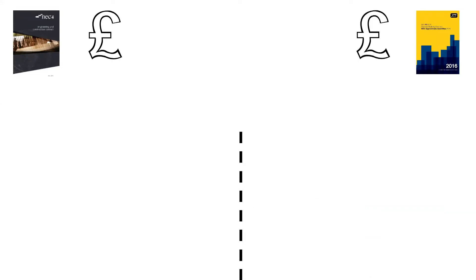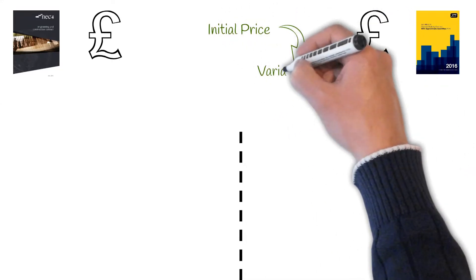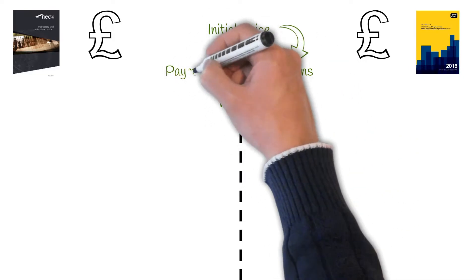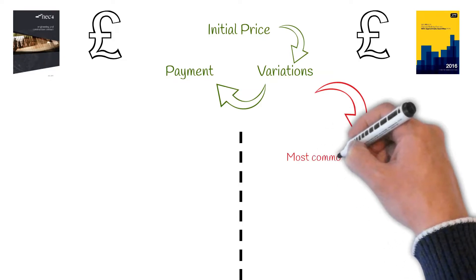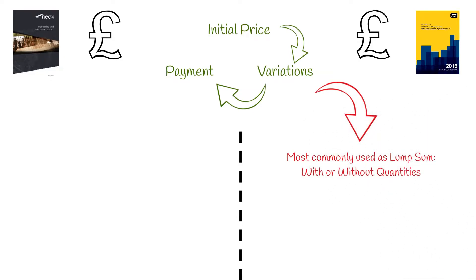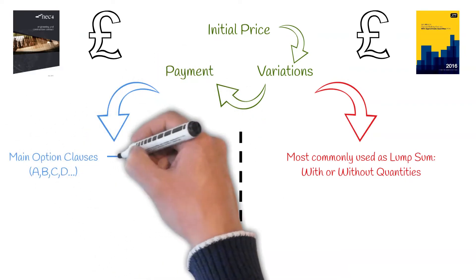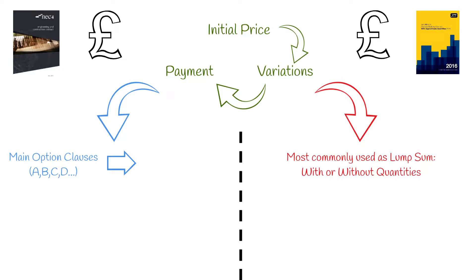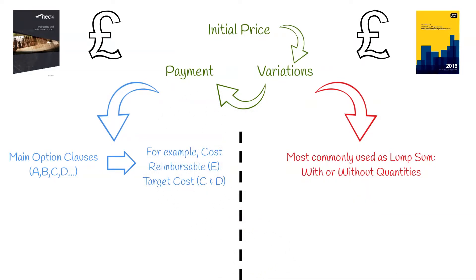Cost. The cost to the employer goes in three stages: initial price, variations and final or interim payment. Both contracts address these stages differently. JCT is most commonly used as a lump sum contract with or without quantities. NEC goes further with pricing methods by providing options for how work is procured, including cost-based open book contracts such as cost-reimbursable or target cost contracts, where the profit and loss is shared between the employer and the contractor.